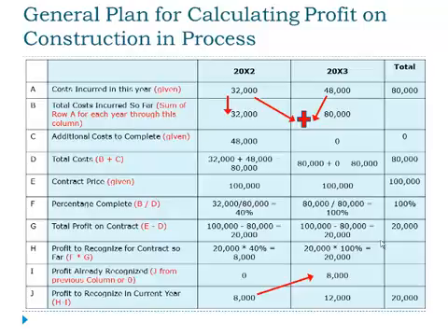Now in H, we finally are ready to calculate how much gross profit there is on the contract so far. In 2002, the gross profit is $20,000 multiplied by percent complete 40%, or $8,000. In 2003, we're completely done with the project, so our gross profit of $20,000 is multiplied by 100% to give us $20,000.